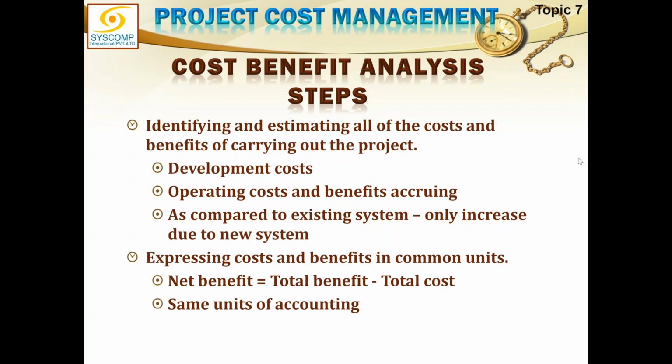Do you get me? Yes, I got you. Total benefit minus total cost. Exactly. This is also called net profit. So if the answer is negative, that means it is not feasible. If the answer is positive, only then it is feasible. Then we compare all the various options to see which is the most suitable. Okay, that much is okay.